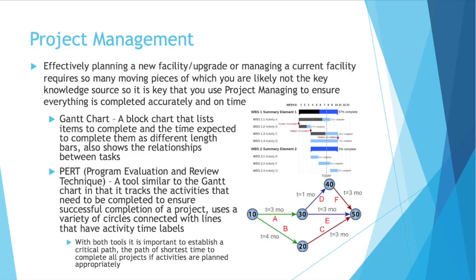Many people prefer a PERT chart. PERT is an acronym that stands for Program Evaluation and Review Technique. It's similar to the Gantt chart because it tracks activities that need to be completed to ensure successful completion of a project, although it uses a variety of circles connected with lines that have activity and time labels. With both your Gantt chart and your PERT chart, what really matters is the critical path — the time it takes to complete all activities. It's important to know how long each activity takes, how they are related sequentially, and what activities can be done in parallel at the same time. If you're not effectively managing a project and doing every activity one after another, something that might only take eight months could easily take three years.